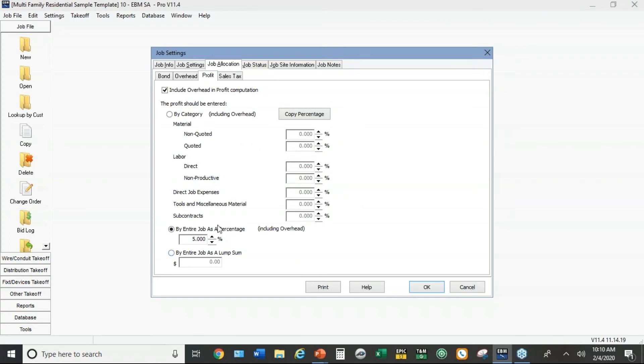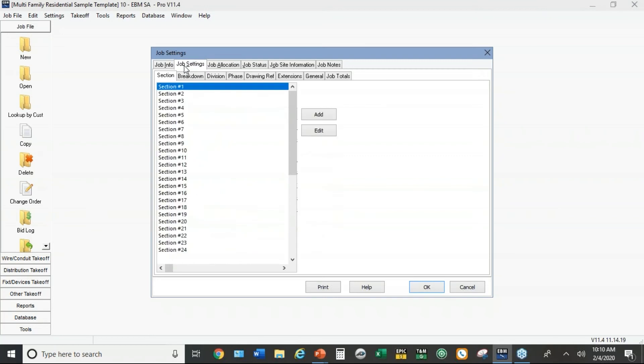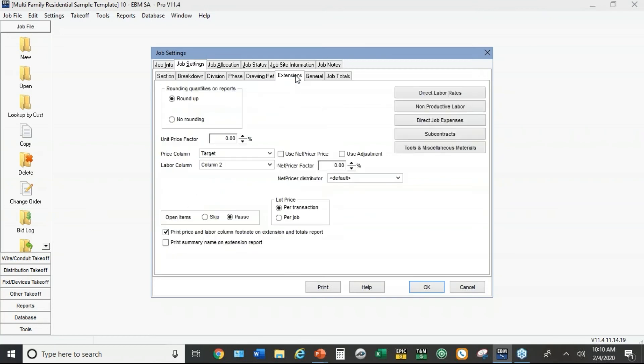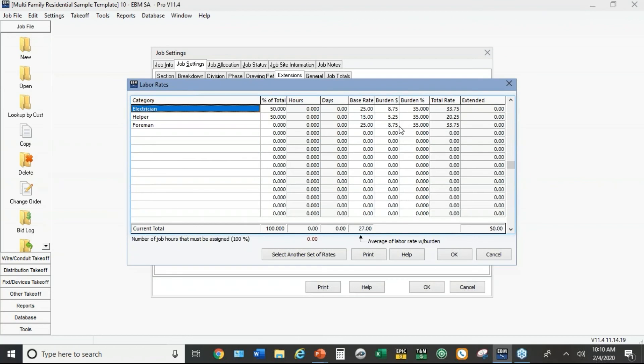And then under job settings extensions I left the price of material at target, the labor at column two. Some of you might want to think about dropping that a little bit. Multi-family residential is probably a best case scenario for productivity. And under direct labor rates I've got a different crew mix. I've got half electricians and half helpers with lower rates.